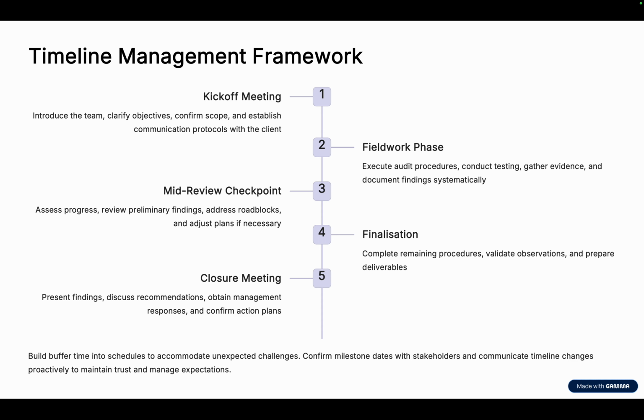Post review, you can move towards the finalization, considering the review inputs from the reviewer, and after finalization you can move to the closure meeting. After the closure meeting, you can move from the site, or you can plan your next month's work also. So all those things you need to consider while planning your audit.